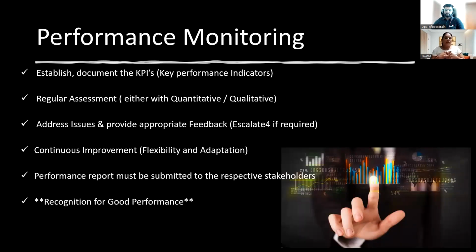And how do you monitor? The person is coming every day to the office. It might be a vendor who is working at his premises or at our organization. We don't know, right? What is he working on? How do you measure the performance of that? Okay. You need to establish a key performance indicator, and a reporting structure has to be there. Like what is the exact activity the vendor is working on? Fix the timeline to submit the report, whether it's a weekly, fortnightly, or monthly report.